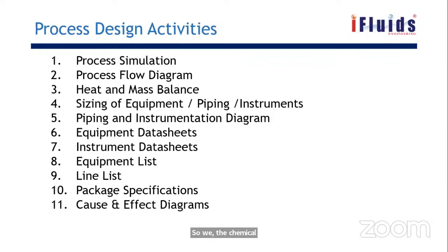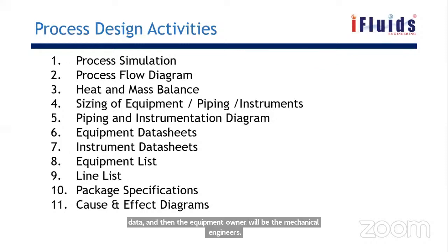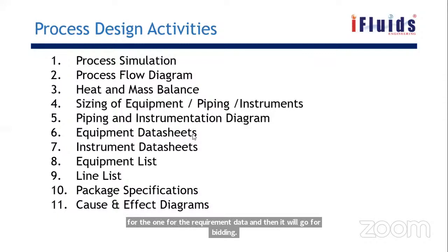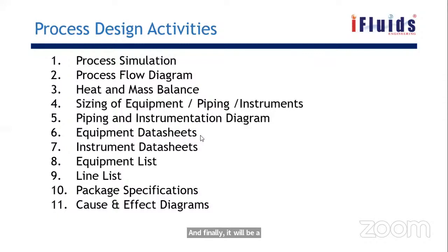So in the same engineering company, they will take care of the next steps. They will give it to different vendors, get the quotation for the required data, and then it will go for bidding, and finally it will be awarded to some vendor, and then they will go for manufacturing of that particular pump at that vendor company.